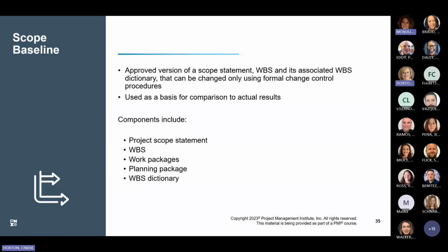A baseline is the approved version of a work product or plan. Actual performance is compared to baselines to identify the variances. The scope baseline is the first of the 3 baselines to be identified. Because changes may be required to meet either schedule or budget constraints, the final baselining of the scope is done simultaneously with the other 2 baselines, the schedule baseline and the cost baseline.